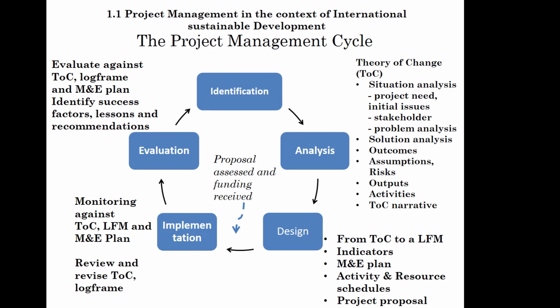After you have done this, then you submit your project proposal to the agency where you are working, or you submit the proposal to some donor for requiring funding and for working on the region that you are targeting. If the proposal is positively evaluated, then you are in the position of starting the implementation of the project, which is the 4th phase of the project cycle management.